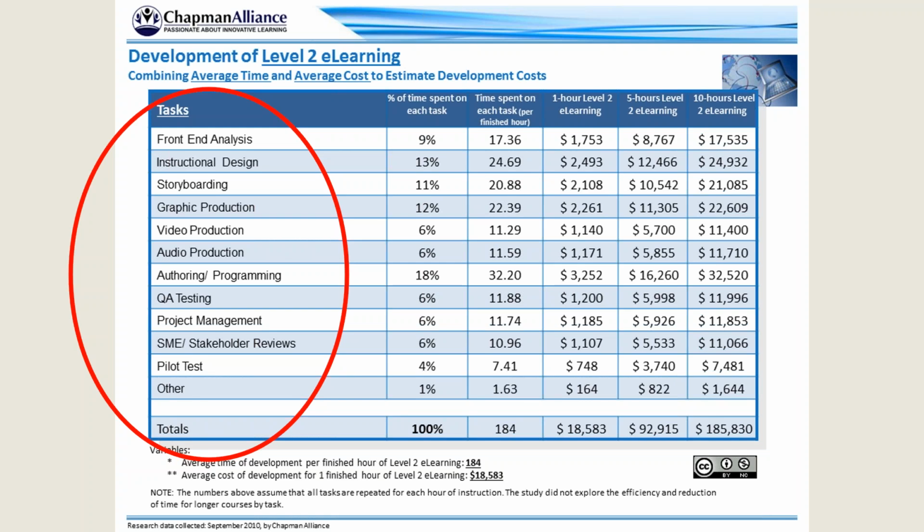And when you think about it, when you start laying out, especially if you're a consultant, divvying out your hours for a client, really look at this as, well, do I agree with that or not? Can I do storyboarding quicker than, say, 20 hours or so? Probably. But 20 hours is half of a business work week. So you're putting in 2 or 3 hours a day for a couple of days, getting buy-in and approval from your client, and that really adds up to about the same. Now, I do think, like I said, this is a great place to start. That doesn't mean that it's the end-all and be-all.